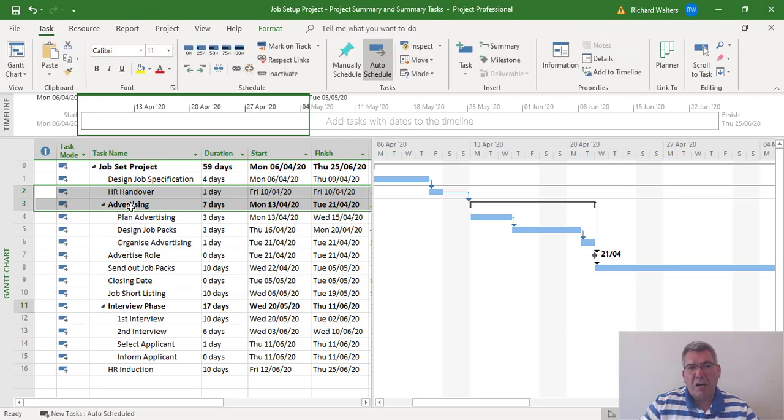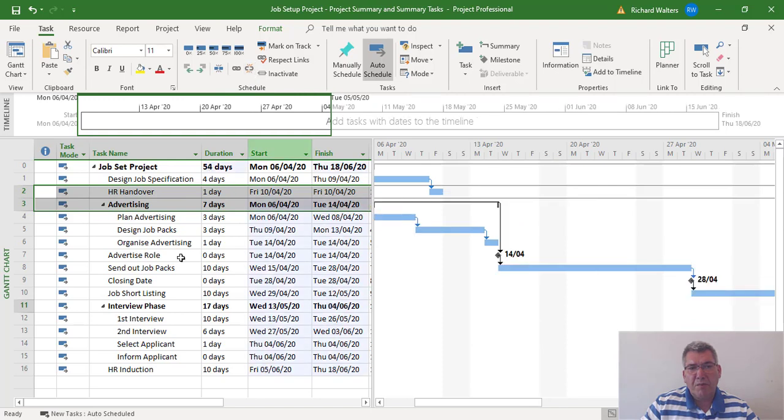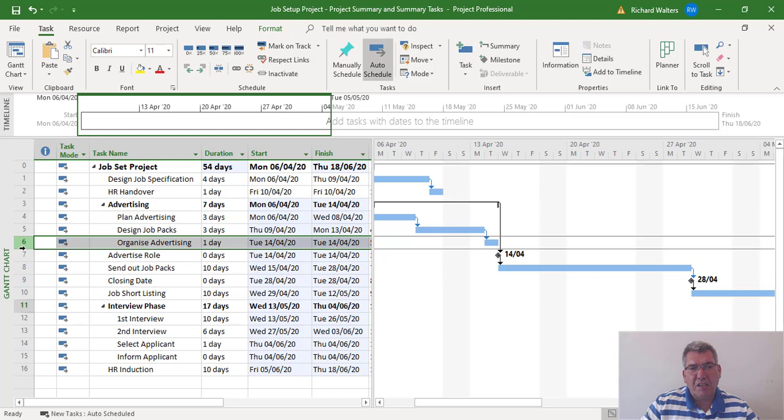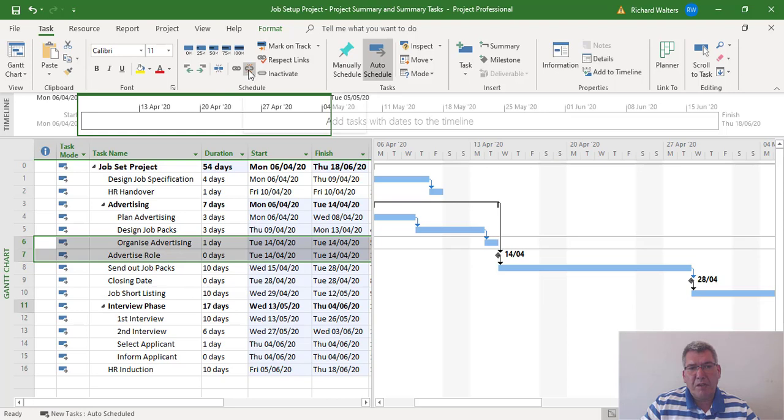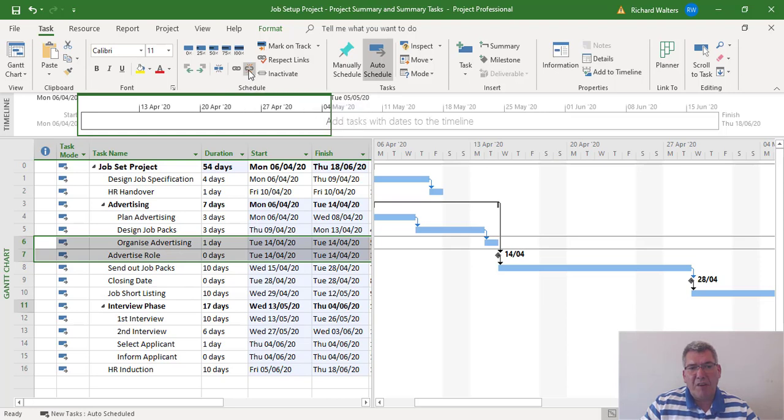I would highlight the two tasks and use the break chain. Then I'd go to the organized advertising and advertising row and break that away, because now I know what I've done. I've now isolated advertising by itself.